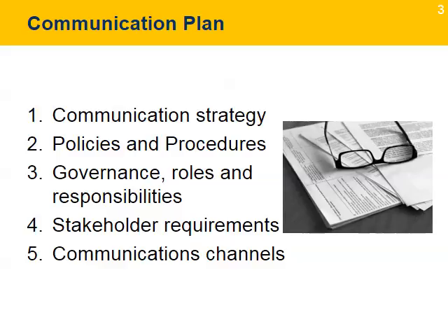A communication plan facilitates the effective and efficient communications between the project leader and the various internal and external project stakeholders. A communication plan defines the general communication requirements of the project and includes the following components: a communication strategy, communication policies, governance with roles and responsibilities for communication, the communication requirements from the stakeholders, the roles and responsibilities for communicating in the project, and the communication channels the project will use.